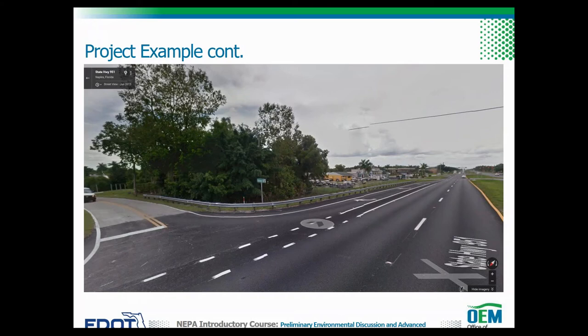These issues we observed may be documented in the preliminary environmental discussion for this project. We may need to look into some of the issues more closely, maybe by looking at GIS data, previous studies in the area, or by visiting the site. A review of GIS data and previous studies may help confirm whether our observations have been previously vetted.